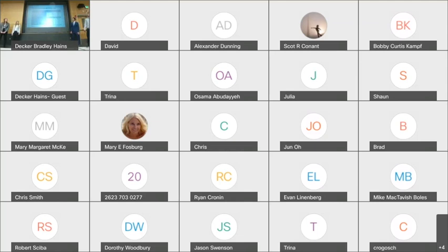In comparison, the total estimation for the private stormwater utilities is about $1.4 million. The private storm system estimation does not differ that much from the public's, other than, as Zach said, the use of 21-inch diameter pipe versus the 24-inch use in the public layout. And the bottom of the table, the private utilities is the largest difference between the 2 layouts. Once again, water and sanitary lines do not come to our site.